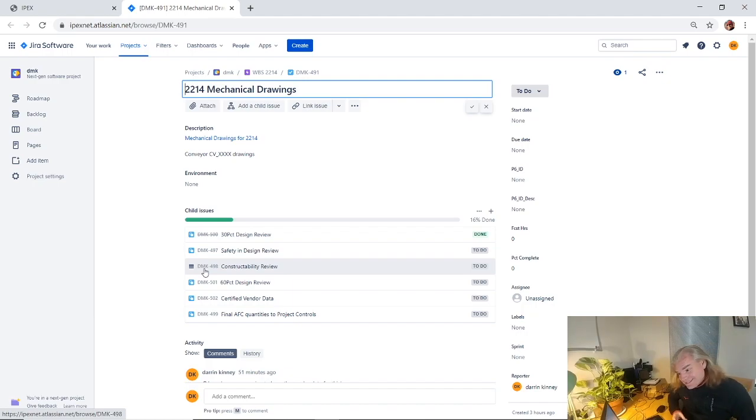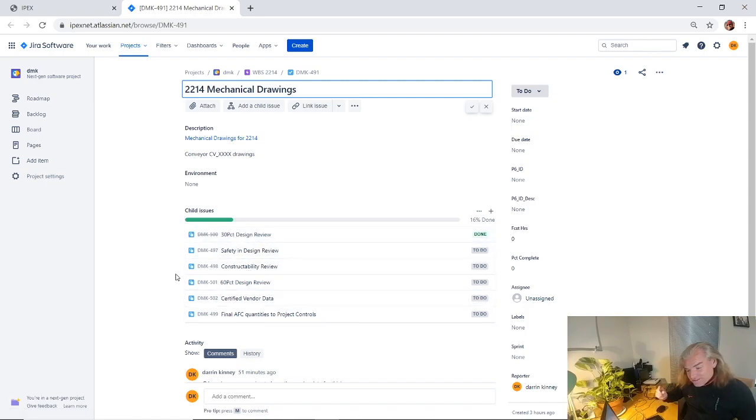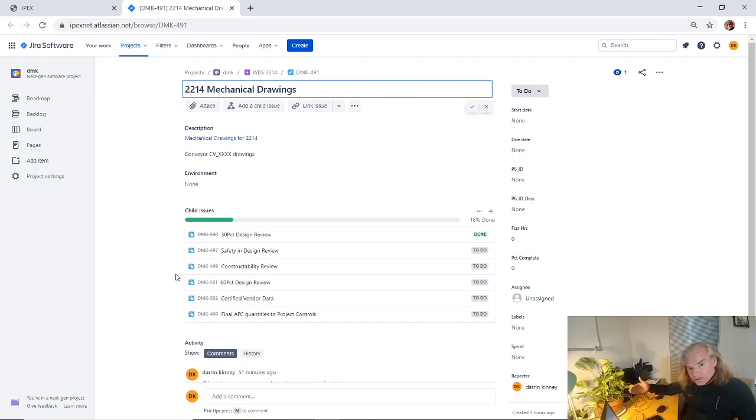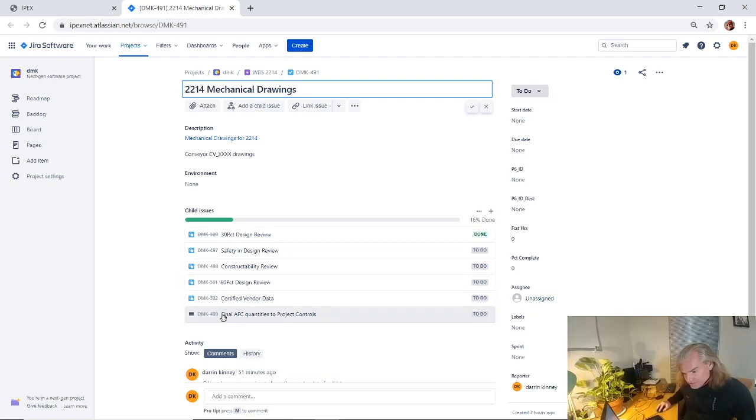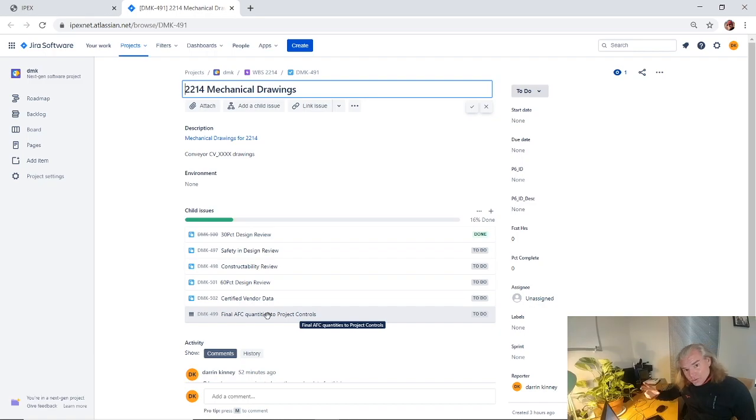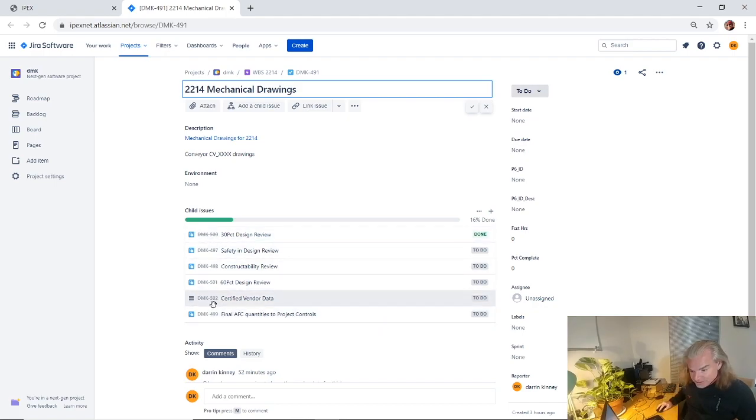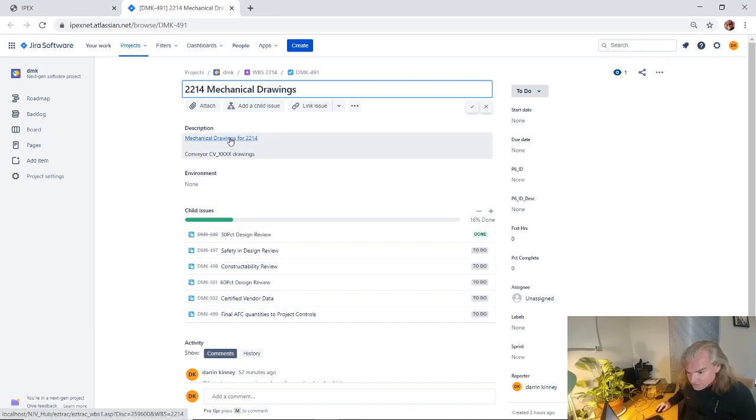But if you think of this stuff as just tasks, and tasks that go to a final date, now if I've got something that says final AFC quantities project controls, now that actually might be something where I need that date, I need to know when that's going to happen. But maybe I don't need to put that date into my schedule. You could actually just pick out which ones you do want in the schedule, which ones you don't.